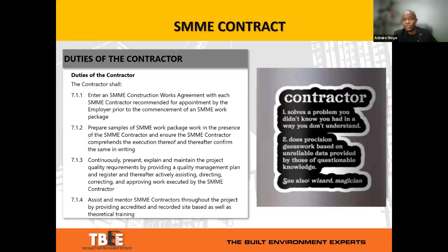So again, by way of example, it will perhaps be in the form of an attendance register. You notify the SMME contractor that you'll be casting your foundations and that they should be in attendance and so on. And you take them through the exercise of how you've gone about the process, how you've procured the concrete mixer, how the guys on the site have complied with their health and safety obligations, how the concrete pour will be undertaken, and so on.